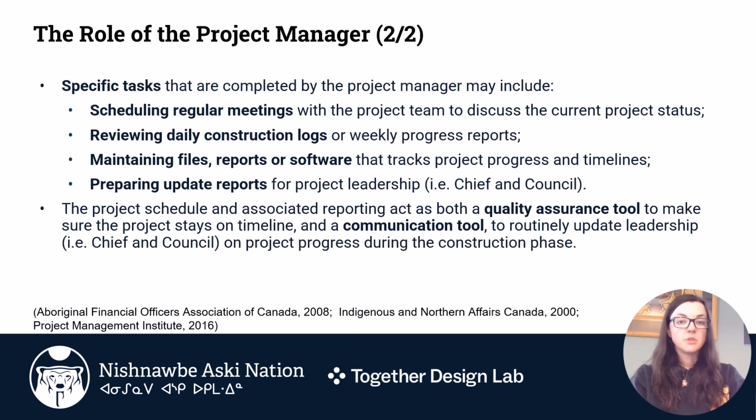Specific tasks that are completed by the project manager may include scheduling regular meetings with the project team to discuss the current project status, reviewing daily construction logs or weekly progress reports, maintaining files, reports, or software that tracks project progress and timelines, and preparing update reports for project leadership. The project schedule and associated reporting act as both a quality assurance tool to make sure the project stays on time and a communication tool to routinely update leadership on project progress during the construction phase.